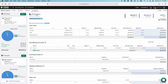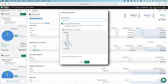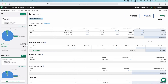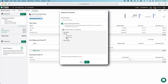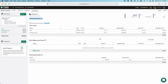Now let's say we're doing a phase one estimate. What you don't want to do if you want to do a phase two estimate is go to edit properties and delete phase one and add phase two, because that's going to override all the work that you've done. So ideally, if you wanted to do a phase one and a phase two estimate, you would leave this one alone and say I want to do a new unit cost. You can do multiple estimates and multiple proposals within STACK, then specify the phase two filter, and run through basically what we just did.